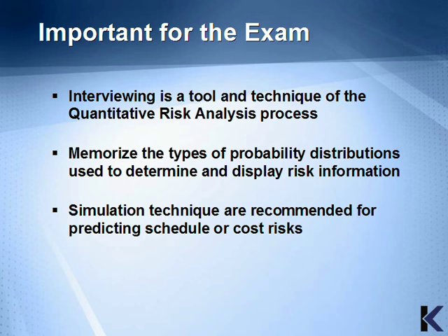Interviewing is a tool and technique of the quantitative risk analysis process, and make sure you memorize the types of probability distributions used to determine and display risk information. Simulation techniques are recommended for predicting schedule or cost risks.